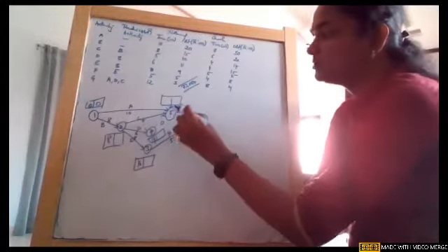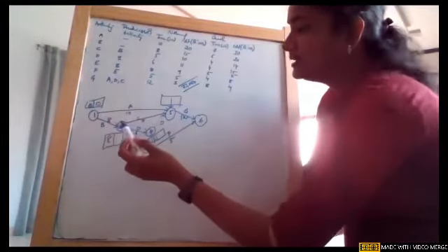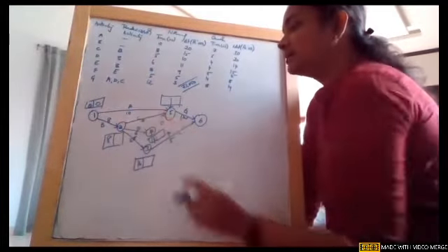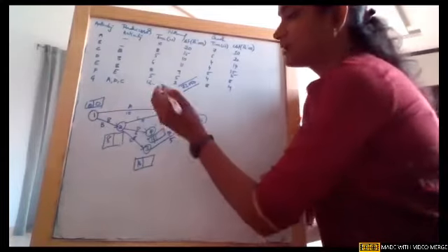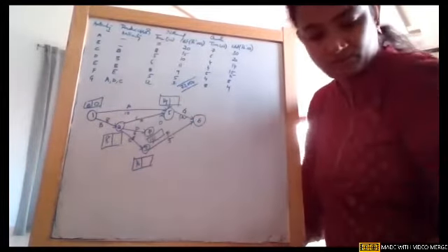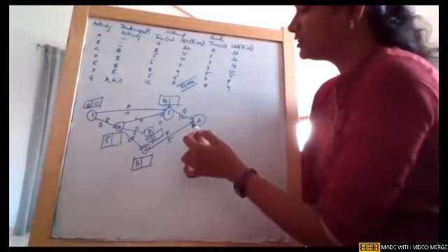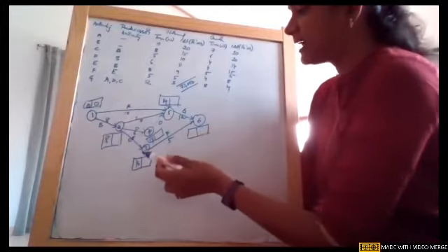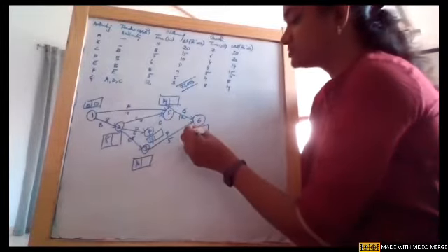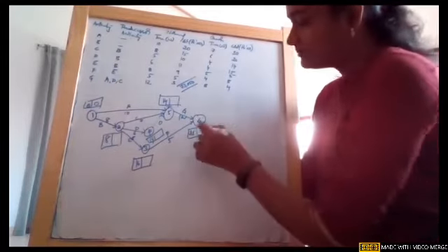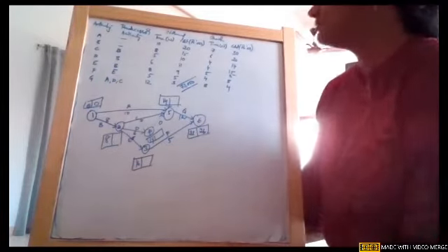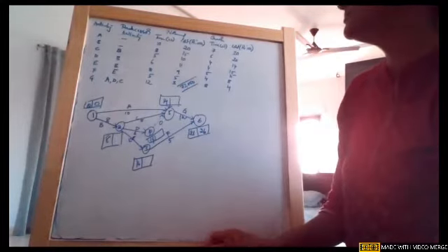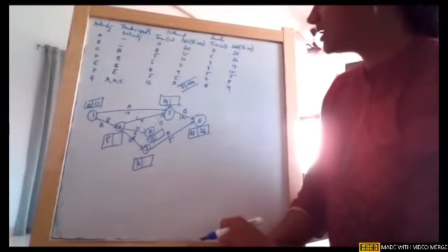14 plus 0, one arrowhead is giving 14. The other arrowhead is giving 8 plus 5, 13. One more arrowhead is giving 10. So obviously the highest one is 14. Then see, in node 6 also there are 2 arrowheads. See the maximum one. 14 plus 12, it is 26, and 16 plus 5, it is 21. So obviously 26 is the total duration of the network.